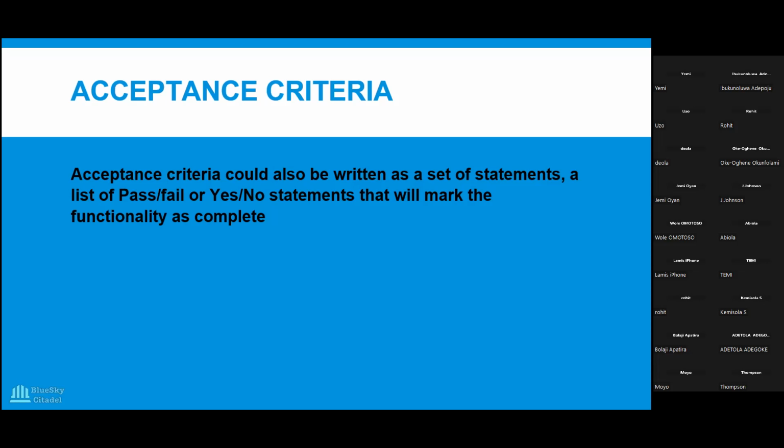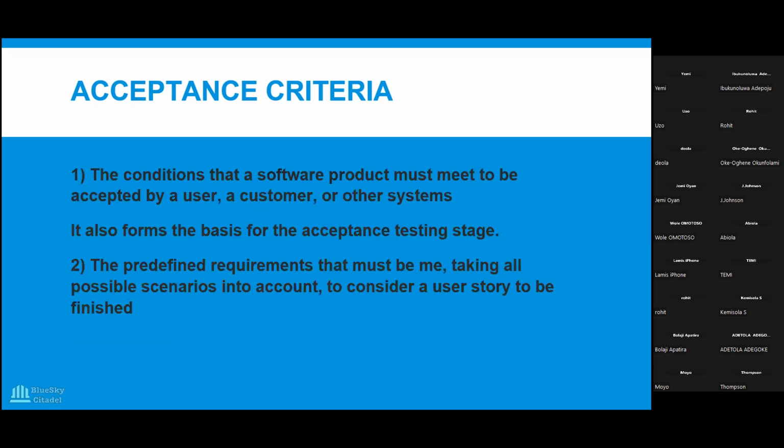So it's always a reference point, because when you're saying you've completed a job, am I going to take your word for it? That oh, we've developed the software application, that's fine, now pay us our money so that we can go back to our employer. It doesn't work like that. You'll be showing the organization what you've done, so that software application must have passed through a number of tests. And that's where the acceptance criteria comes in. They are the conditions that must be met before the customer can say, okay, yes, it is complete.